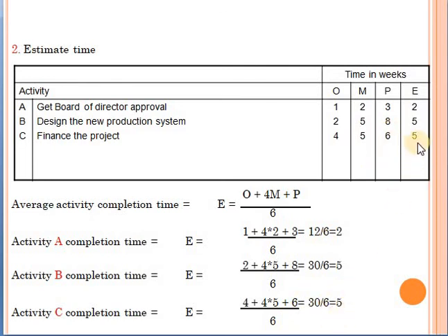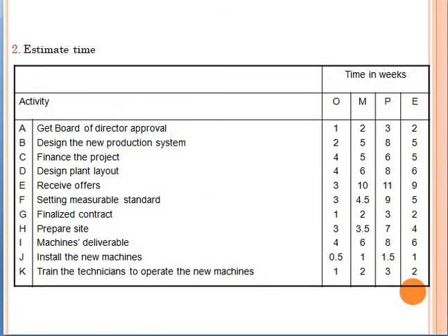So I will go to the table of activities that I have with the 3 values that I get, and I will create a new column getting the completion time of all the activities that I got from the WBS. So the output will be like this. Now under uncertainty, I was not sure about the duration or the completion time of the activities.